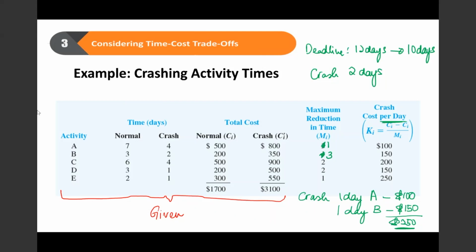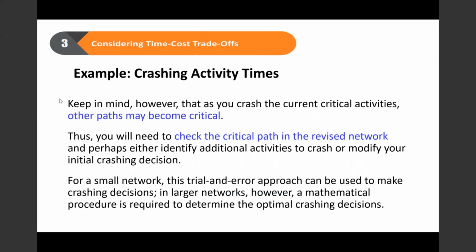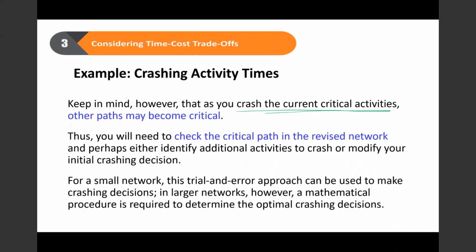But bearing in mind, important here is keep in mind, however, when you crash the current critical activities, other paths may become critical.